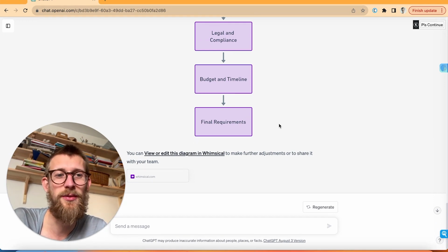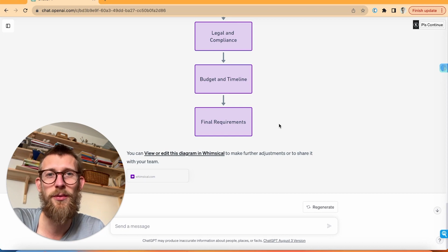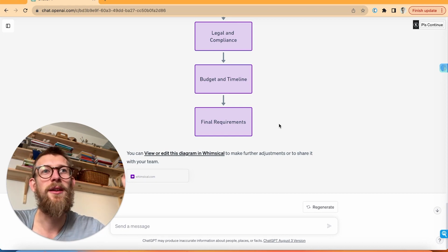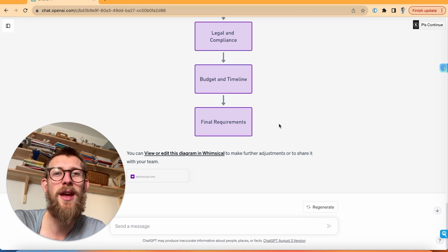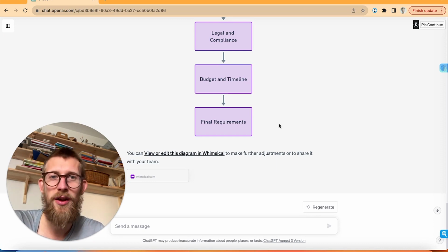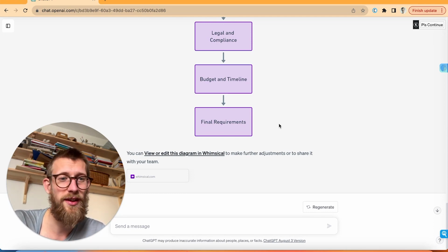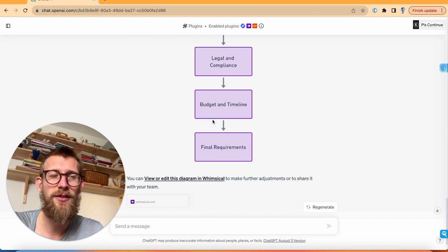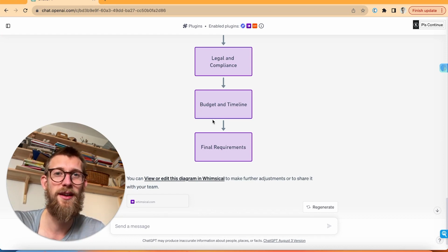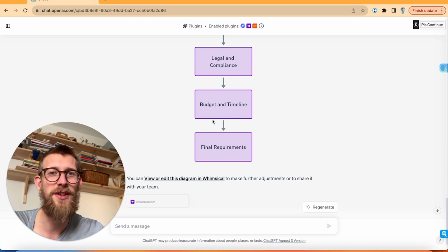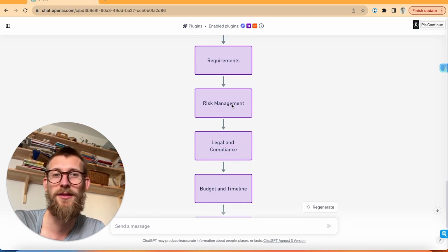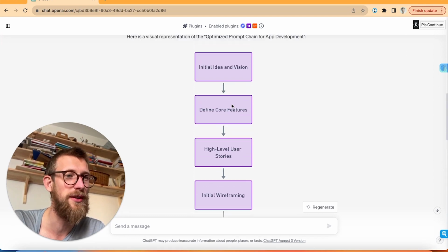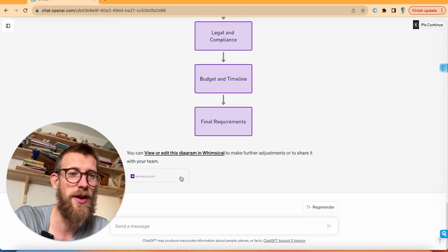The final requirements is what we want to land in. It's basically a big document that will give the client a brief of how we have perceived their solution, the wireframes that they can expect, how much it's going to cost, how long it's going to take, and everything that they can sign off on, so we can do the scope really tight, so there are no risks for other features to come into the first initial stage of the project. So everything will be thought out.